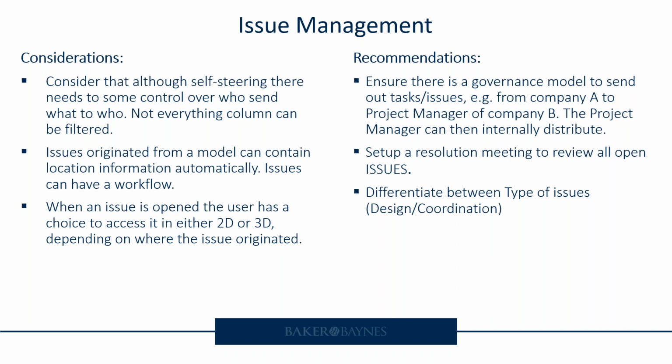And then also really differentiate between the different types of issues. Is it coordination? Is it design? What type of issue it is, because it gives people more information to understand how to deal with that. And from a project manager point of view, you're on the project, you get to do some analysis on the issues to really see what root causes are popping up and where we are having the most issues.